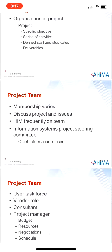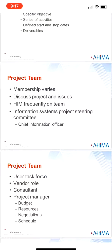Most, if not all, information systems require a project team of individuals to successfully implement the information system. The number of individuals and the composition of this team vary from project to project. For example, if the healthcare facility is implementing a chart deficiency system for use only in the HIM department, the project team should include the appropriate people in HIM and information systems — it would not need to include physicians, nurses, risk managers, or laboratory staff. If implementing a computerized provider order entry system, the project team would need representatives from physician staff as well as HIM, nursing, lab, pharmacy, and other impacted departments.